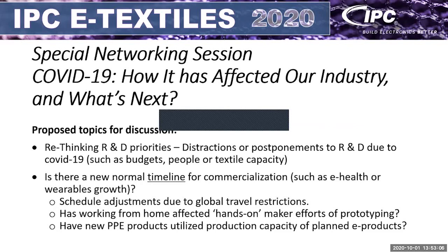We have all the elastic made, but there were things in short supply. And I remember sitting in my living room deciding I would order 500,000 yards of elastic in March before I had a single order, because I knew if I didn't place the order, I'd get cut out of the supply chain. Because that was the thing that was most difficult to get right then. So it was a little bit of like what's available, talking to people, going back in the supply chain.